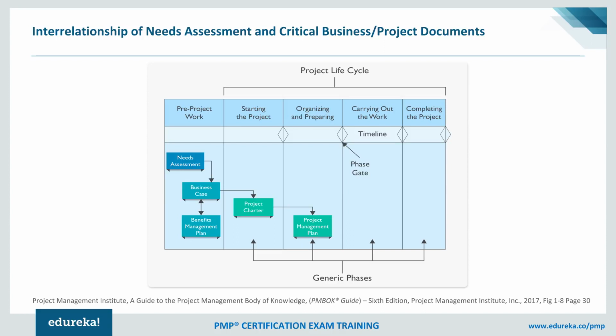The project charter is also prepared and given to the project manager, because then the project manager is authorized to use different resources on the project. At the same time, he is then formally engaged on the project. So actual project activities will kickstart once the project charter is in place onwards. Before that, whatever activities happen are basically categorized under pre-project work activities.